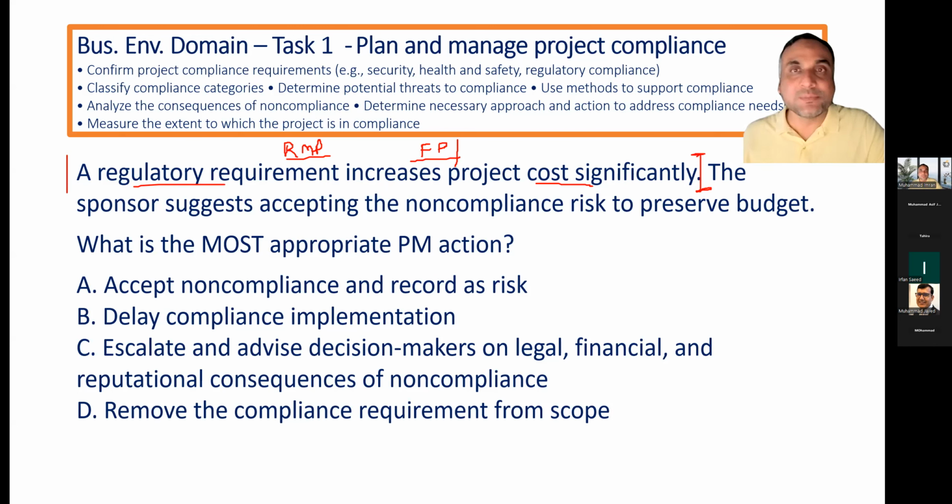To balance the risk between buyer and seller, which type of contract can you use? Fixed price, Economic Price Adjustment, EPA. Any changes because of any situation can be handled with the economic price adjustment strategies.